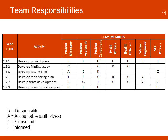A useful tool to assign team responsibilities in the project is the RACI matrix. The matrix lists all the activities in the project and a short description. All team members are identified and their roles defined as either Responsible, Accountable, Consulted, or Informed. Some rules: there is only one person with a responsible role per activity, only one person as accountable per activity, but there can be many people that are consulted and informed. This matrix helps the team understand roles and responsibilities in the project and avoid duplication of efforts and conflicts caused by unclear roles.